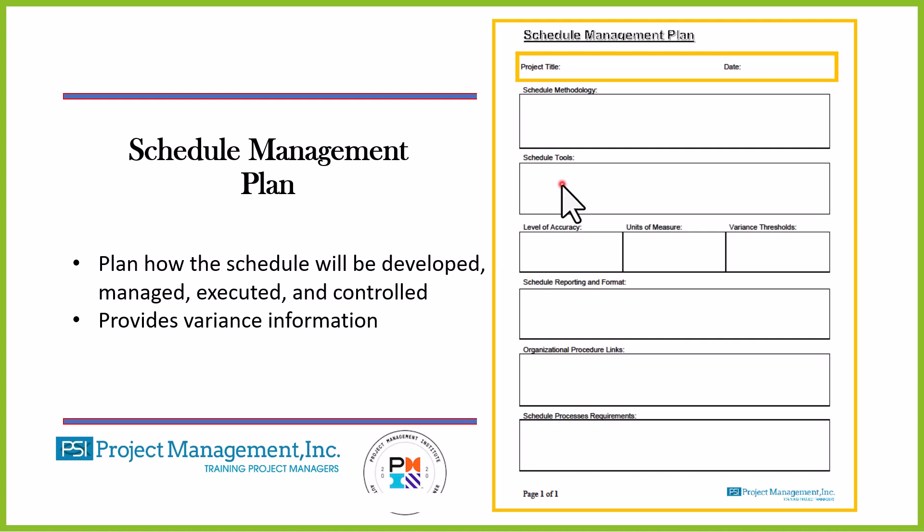The schedule management plan covers: what is the methodology, what tools will I use — Microsoft Project, Smartsheet, Soho, Primavera — the level of accuracy (am I estimating within a day, within hours, within months), the units of measure, and the variance threshold we mentioned.